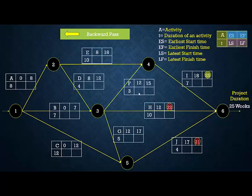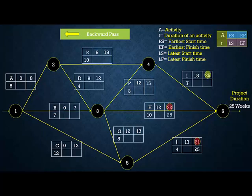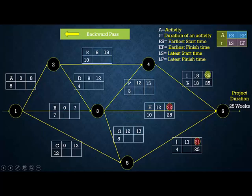Now we perform the backward pass to find the Latest Finish (LF) and Latest Start (LS) times. For the tail activities I, H, and J, the LF is set equal to the total project duration of 25 weeks. LS of I = 25 − 7 = 18. LS of H = 25 − 10 = 15. LS of J = 25 − 4 = 21.